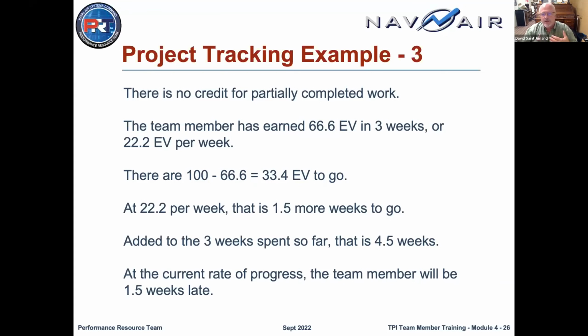This is interesting. At this point, the developer should be preparing to re-estimate the work for the database manipulation and the business logic, because he has a historical track record of underestimating how much time it's going to take him to get through his work.